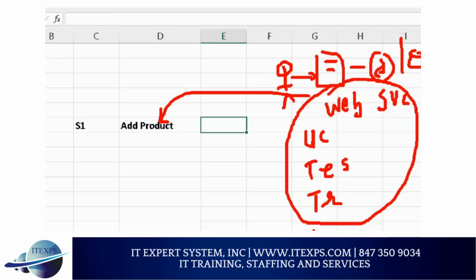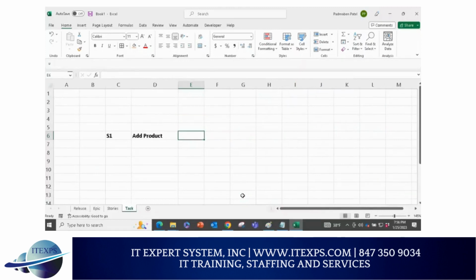And zero sprint is for the team, not for the Scrum Master or product owner. It is for the team to know about it, install software, install machines, configure and all. Okay? So zero sprint is for the development team. They are the development team. They talk to friends and family members, they do research, they go for training, they go through webinars, they go to YouTube videos, they do all the research, the trial and error. Those are the zero sprint to prepare for the real sprint. Questions? Make sense? Okay.